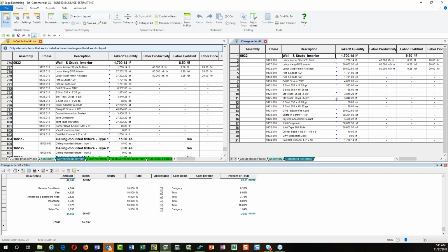When I delete things off of my takeoff, when I go through and see the changes, it'll show the things that have been deleted, and then it'll keep track of those, and it'll delete them from my estimate, from my drawing, if I do it that way. Or if I do it here, I would actually take it over here, and if I needed to delete some items, we could actually delete items or reduce items specifically, which is more of a deductive change order than an added change order. Anything that you make a change to, whether you reduce it or quantity, we can do. So it really makes no difference there. Did I answer your question?